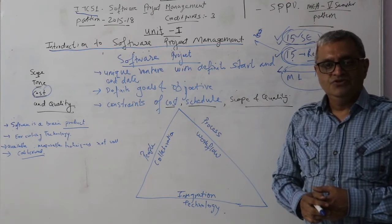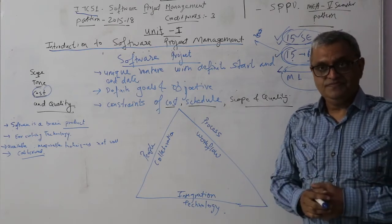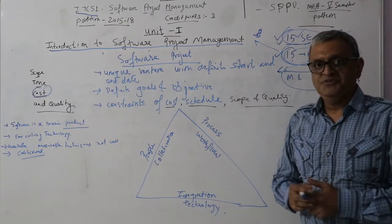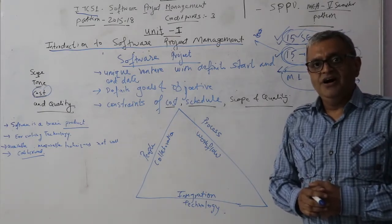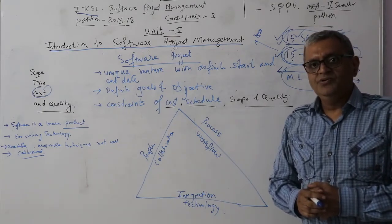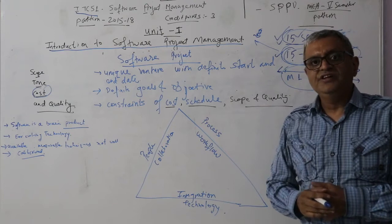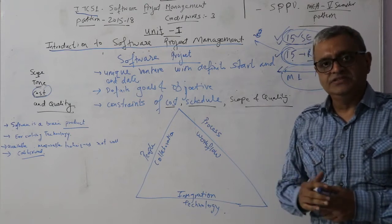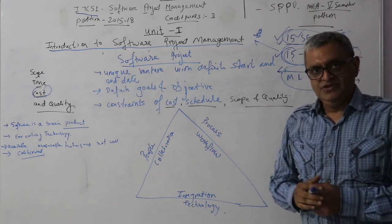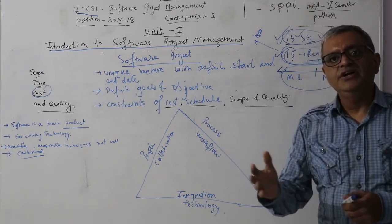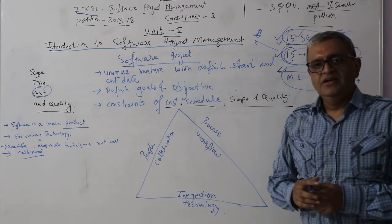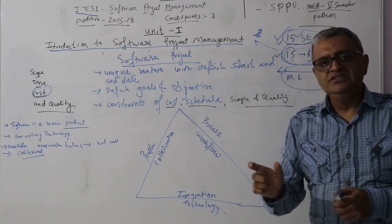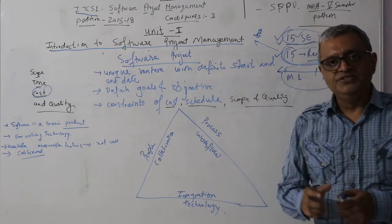The second option: look at certain activities that can be reduced. For example, can I decrease the scope of testing?